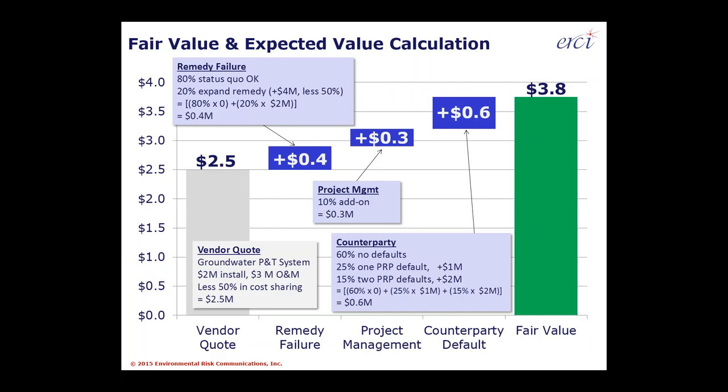In terms of fair value and expected value, an important process is to step back from third-party or vendor quote costs and factor in the key issues to get to fair value. Our rules of thumb are: look at remedy failure, project management, and counterparty default to get from third-party costs to fair value. In due diligence you're working toward the fair value measurement — creating a brand new fair value for a site-specific or portfolio-wide environmental liability. What you may only be given is the vendor quote without allowances for remedy failure, project management, and counterparty risk.